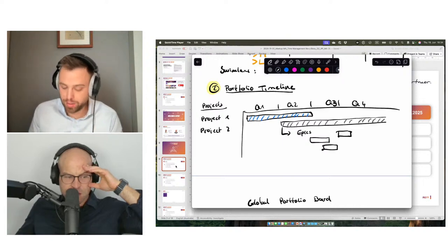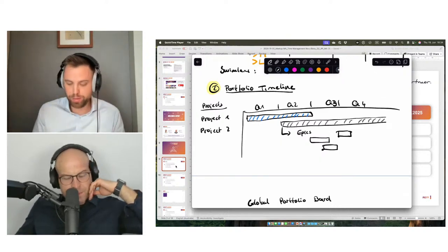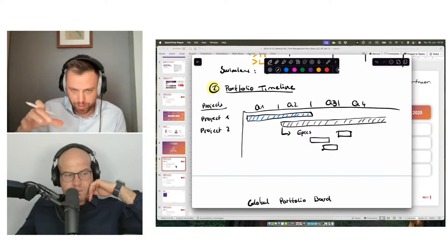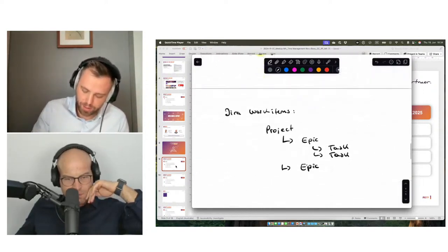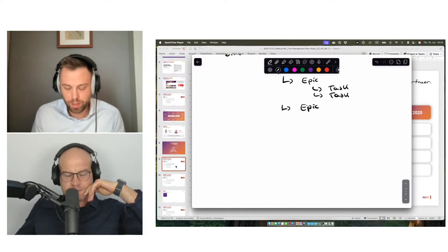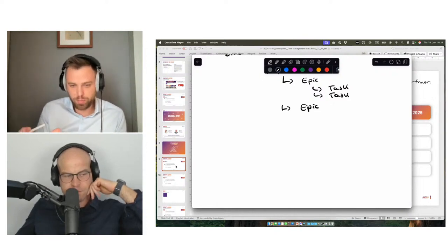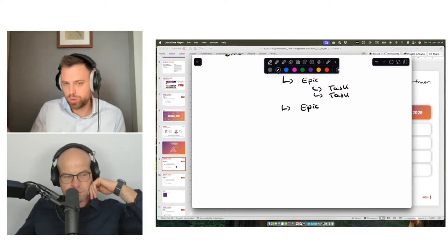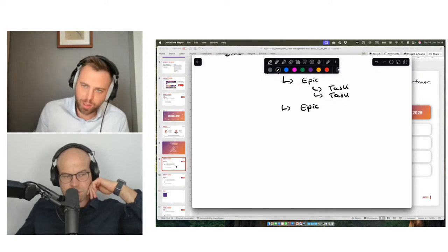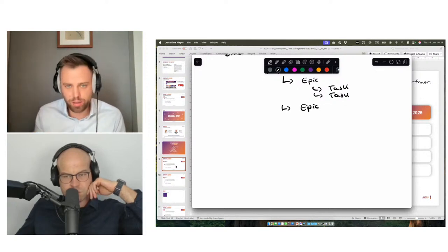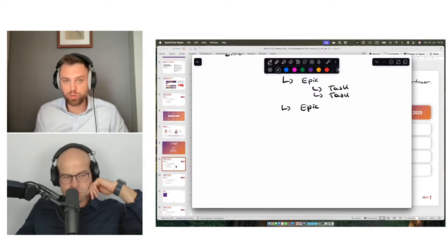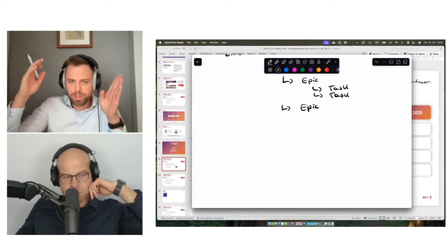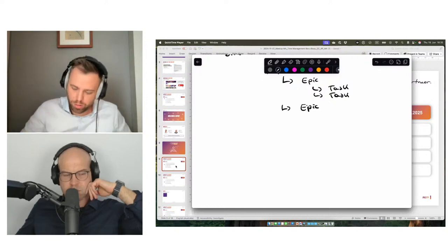Yes, we had one other client example where we built up the portfolio management on a department level. And the main pain point on a department level is resource management. What department heads need to manage is their resources, right? Their limited capacity, more projects are coming in, and somehow they need to juggle and manage this. So for a department head, it's very valuable to be able to see not the task level, but the epic level, to see how full is my actual month.